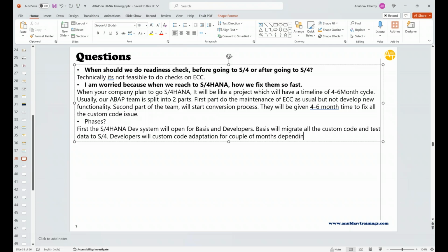depending on the scale of changes. So you did the readiness check and you found 10,000 findings. Now you can do math and calculate. If one developer fixes one issue in 30 minutes, what is your capacity? What is the team size? Like in childhood days, simple math, right?